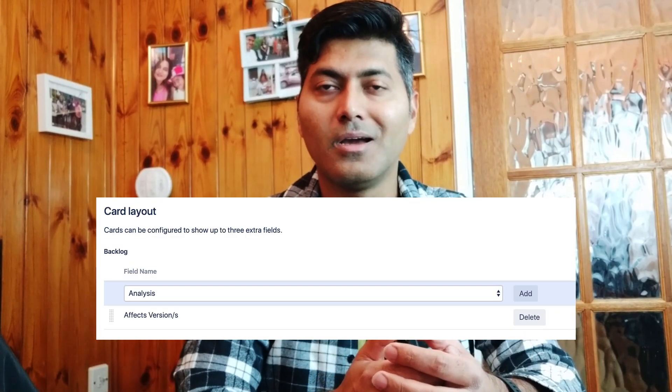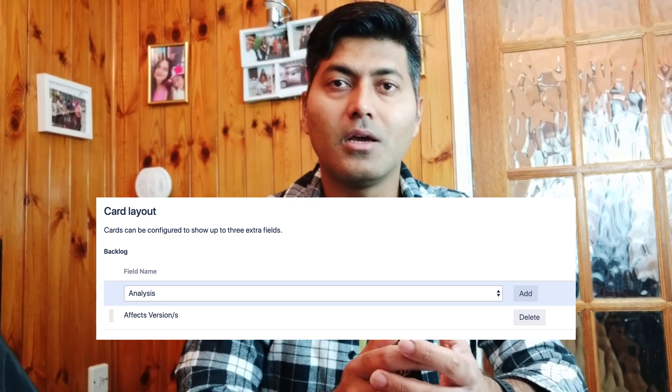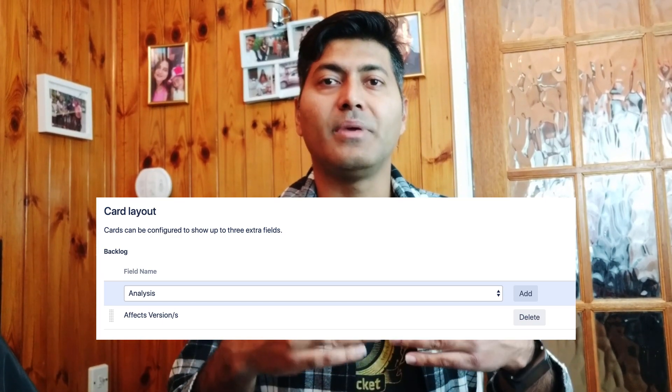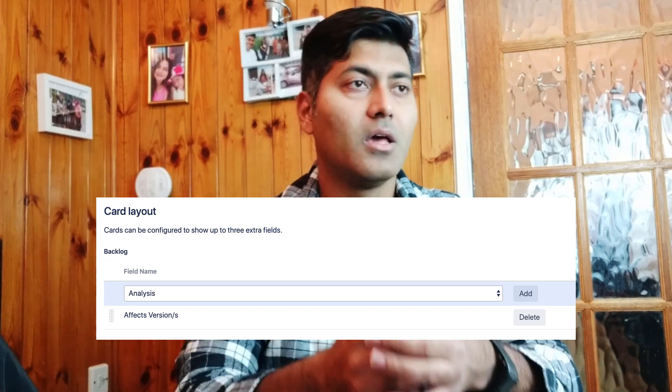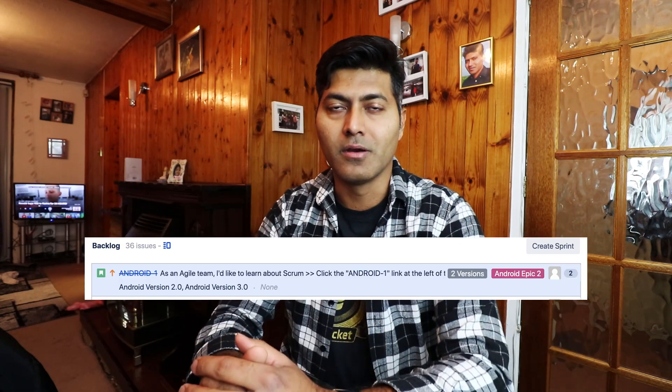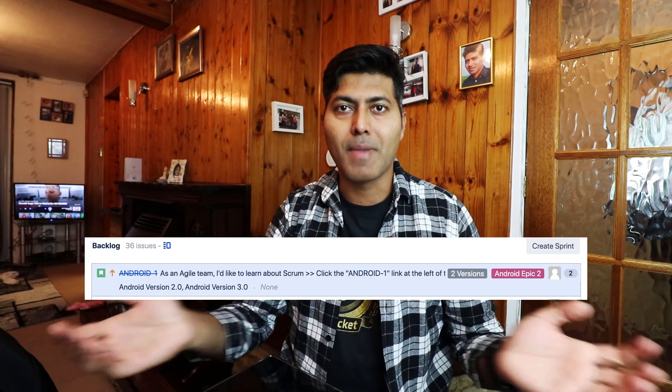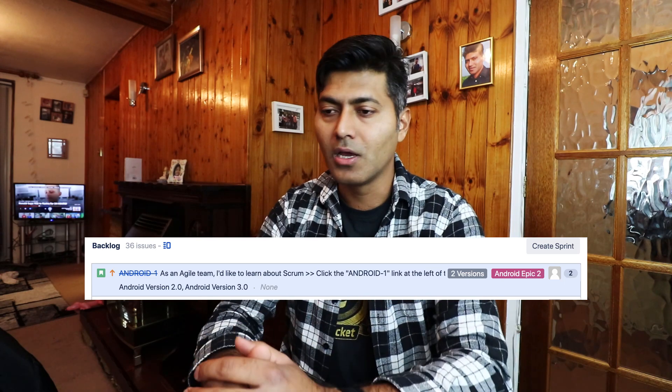If you want to display all versions associated with your issue, you can add the version field to your card. You can add up to three fields to your card, and this also works for the backlog view, so you can see all the versions in the card row on the backlog.